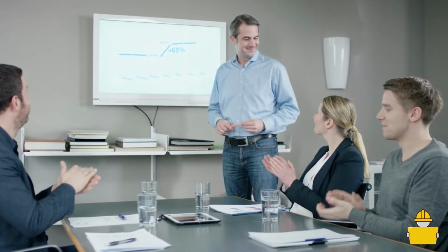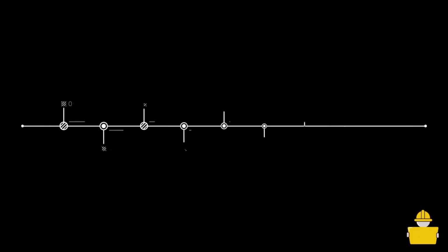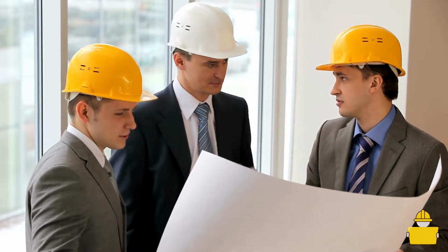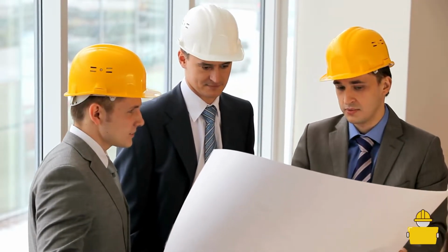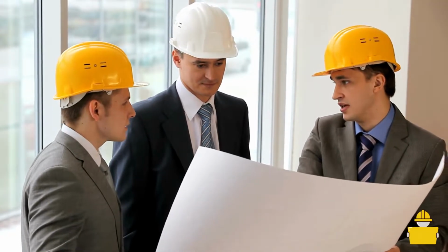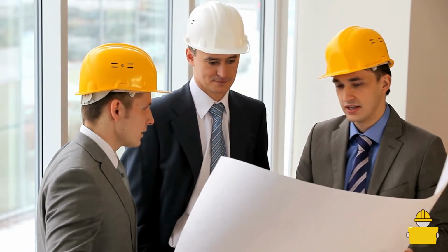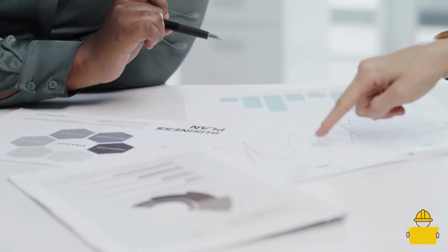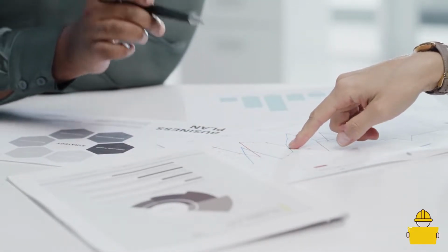Before you start tendering, you need to understand your construction project. The reason for developing your schedule is to assist you in understanding the sequence of your tenders. Not all projects are the same, and on one project you may need your mechanical vendor on site first, another you may need your drywaller. Understanding this sequence is critical to tendering.